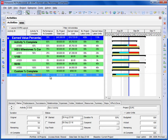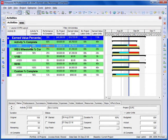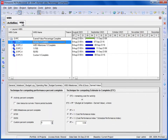The Performance Percent Complete is used to calculate the Earned Value costs from the budget and the Earned Value units from the labour units. The Performance Percent Complete for all activities in one WBS node is calculated based on one of these techniques.